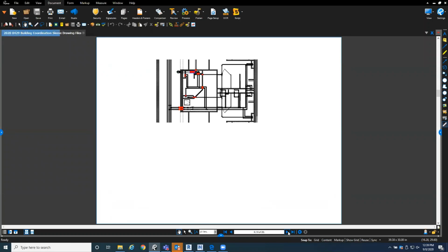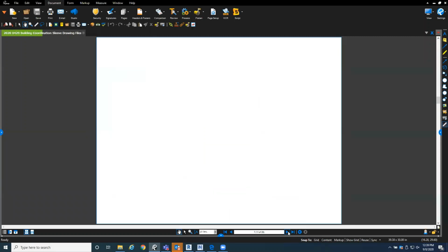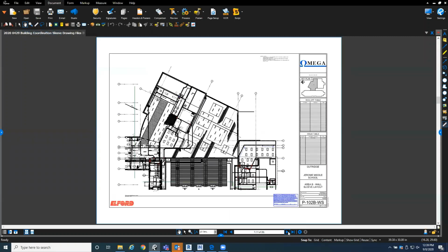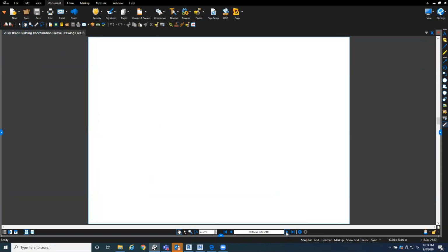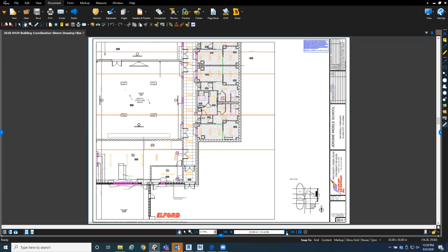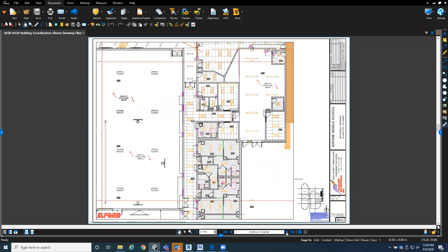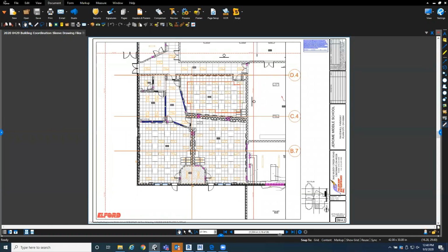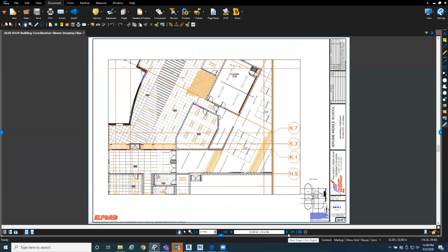So if we need to block out areas for framing, our general trades or our superintendent in the field will be able to work with whoever is doing the framing for us, or if we're self-performing the framing, they know how to block out for louvers or box outs for concrete floors or equipment support.